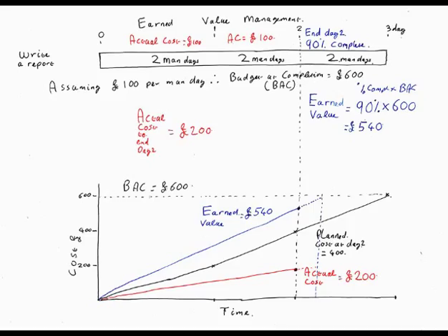So if I extrapolate that I've only got another 2 hours to do, then the assumption is that the future is the same as the past. Yeah, that's right. So you're only going to spend another 10% of your budget. Yes, you're only going to spend another 60 quid. Which may or may not be true.